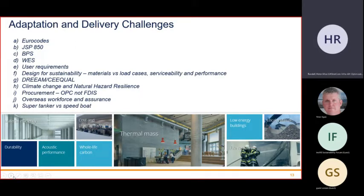We also need to start fighting what I'm going to call the PR, which is it's very difficult to explain perhaps why an air source heat pump is not the most appropriate solution when you're going to install it on an old leaky building into an establishment that is already quite at capacity with electricity, and we're just pulling off the grid. There is no green or renewable power that is feeding it. But you've got to challenge that against the seniors who want a headline.